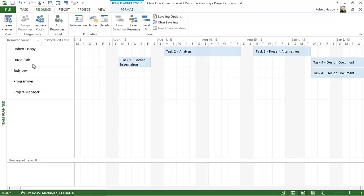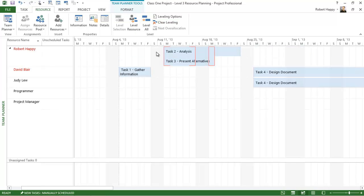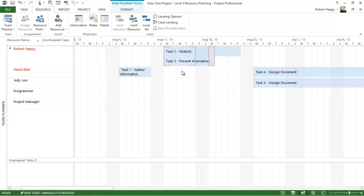These leveling tools are available, and you can always clear the leveling and go back to the original plan and decide to resolve each one one at a time or level all or level one resource at a time. So there's some nice tools in Project 2013 to help you resolve your overallocations.